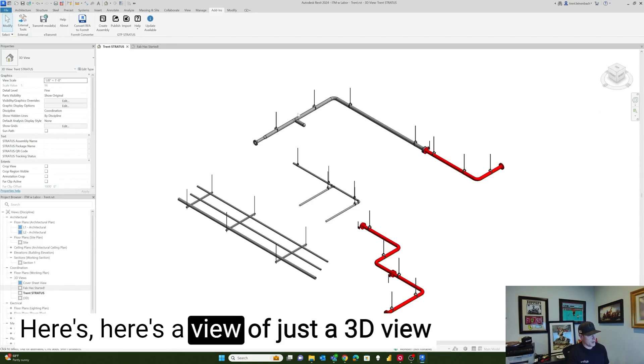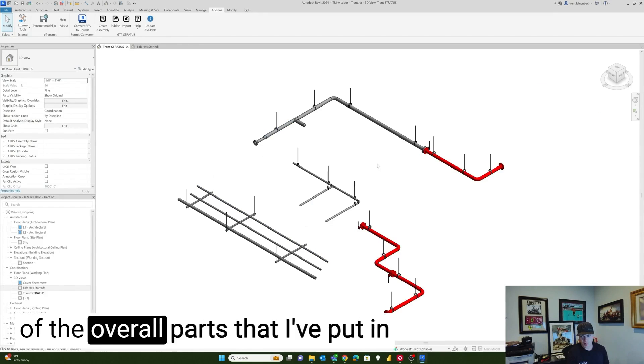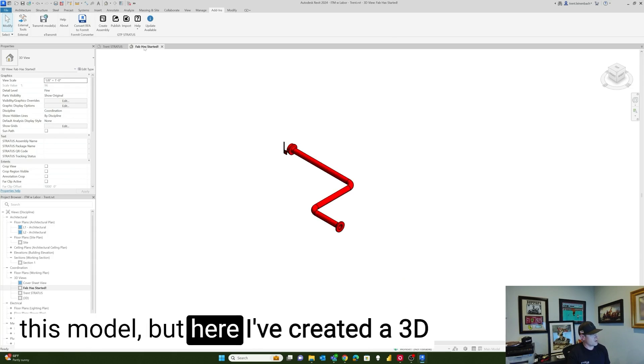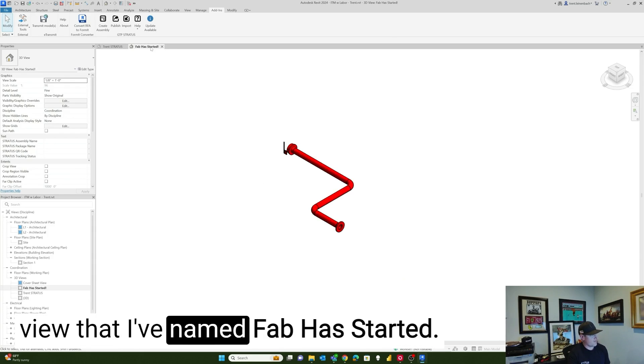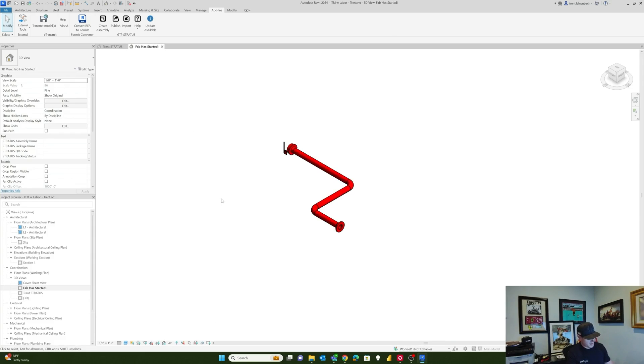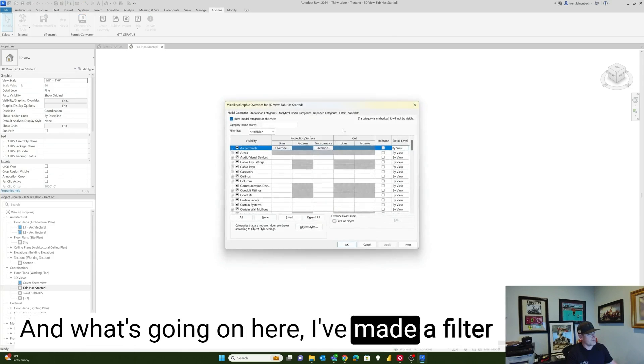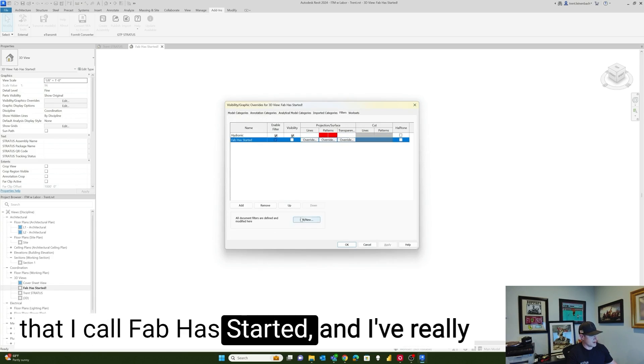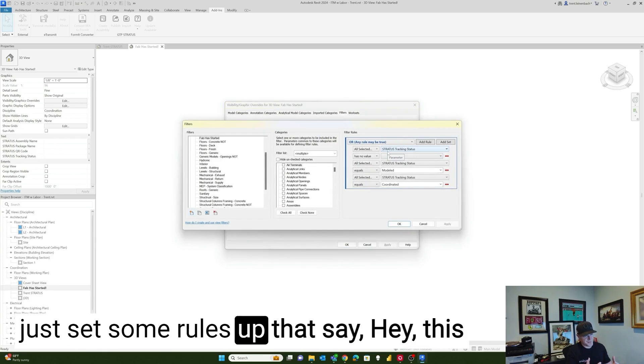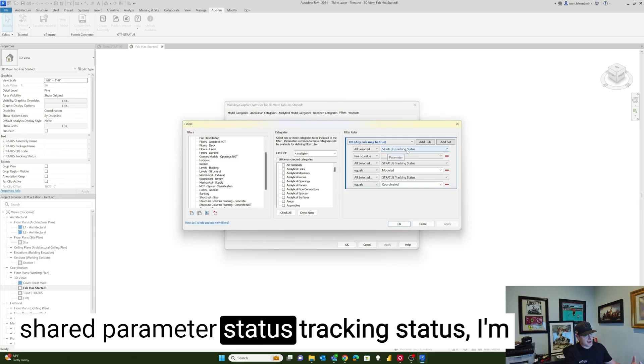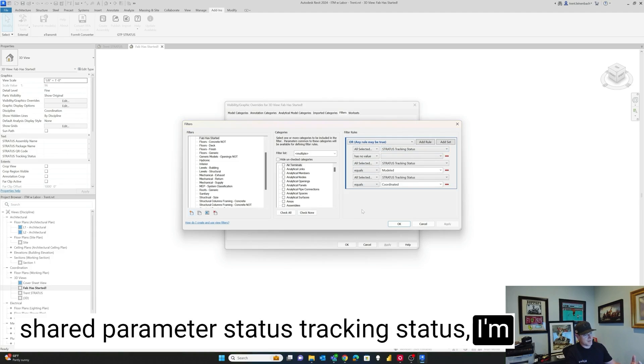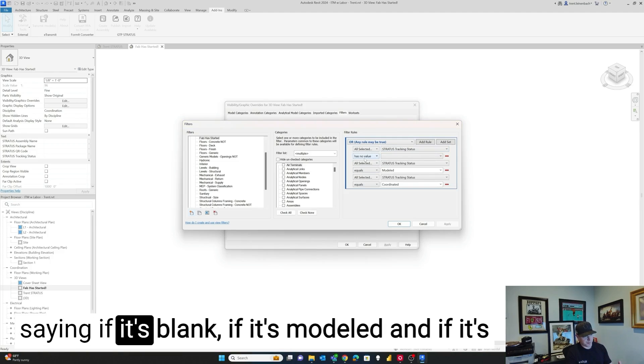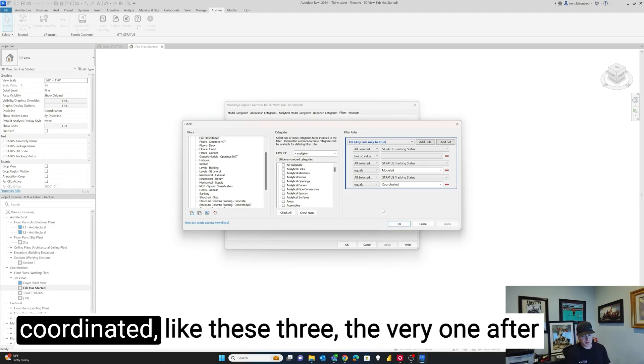Here's a view of just the 3D view of the overall parts that I've put in this model. But here I've created a 3D view that I've named fab has started. And what's going on here, I've made a filter that I call fab has started. And I've really just set some rules up that say, hey, this shared parameter Stratus tracking status, I'm saying if it's blank, if it's modeled, and if it's coordinated, like these three,